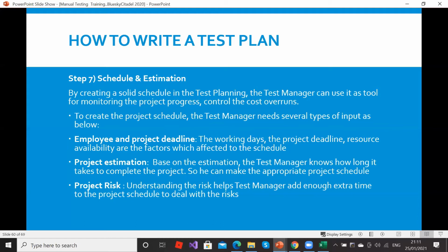You've got just 8 hours to do that. Now, if you can actually do 5 or 10 that day successfully, you're still left with 40, and we have got another 8 hours to do. So when you say you can do 10, we actually just need to pull people in. That's the way the test manager thinks.